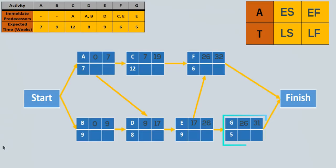Note that although G is the last letter, it does not have the highest earliest finish, because F has 32. So the project's completion time is 32 weeks. The project's completion time is the highest of the earliest finish times of the finish node.